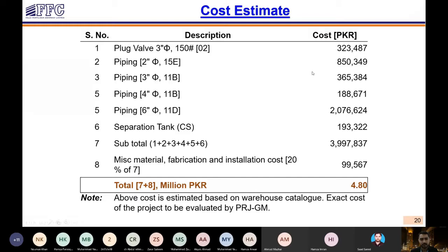If we don't have that available in our records, we ask vendors for a quotation to get that cost estimate done. So you can have an idea that the different materials we expect for the modification are listed and their costs are tabulated. Based on the scope of the job, the fabrication and installation costs are then estimated.